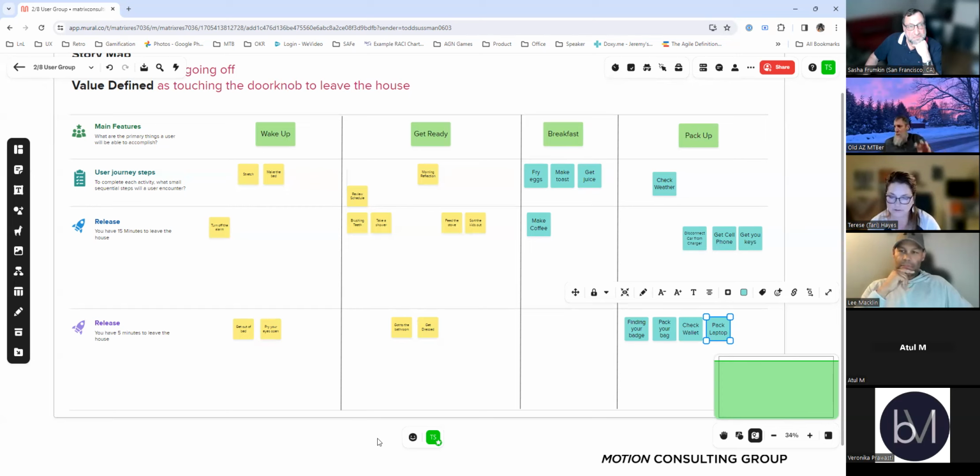And this is why I love this particular game and this particular scenario. If you're interested in introducing user story mapping to your organization, play this game with them and do it interactively, right? Hey, 5 minutes of silent brainstorming where everyone thinks of all the steps that they have. Do your affinity mapping exercise to define your features, then go through and be ruthless in deciding what can wait. Hey, what's our 2-year plan? What's our 18-month plan? What's our 12-month plan? What's our 6-month plan? Whatever number fits for you guys, for sure.